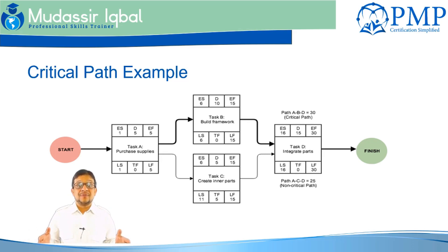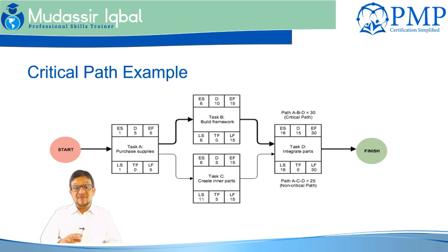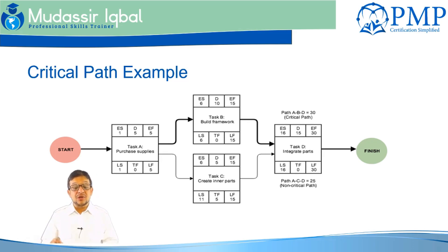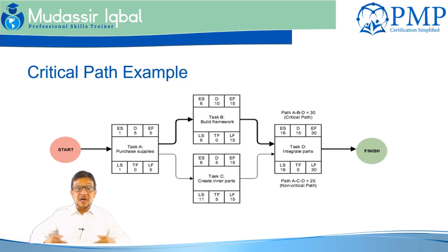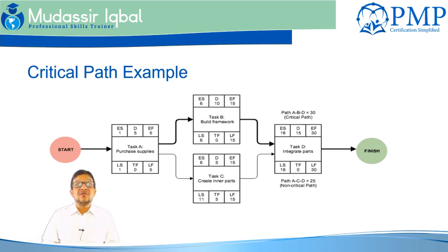We may have multiple critical paths and multiple near-critical paths. The critical path represents the minimum project duration — the latest time at which the project can be completed. It also reveals the earliest possible date the project can be completed, or how much you can delay the project without affecting the final delivery date.